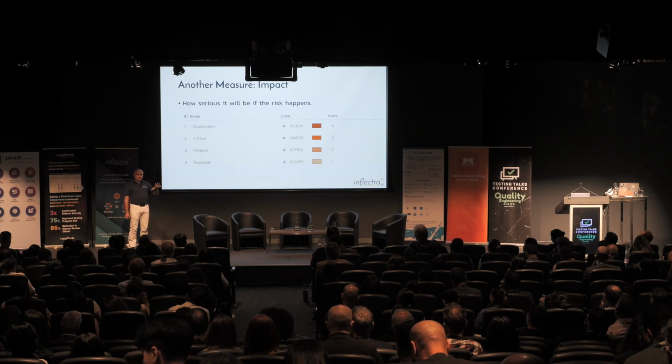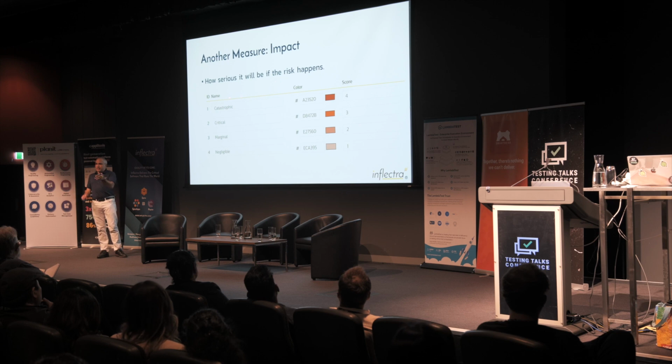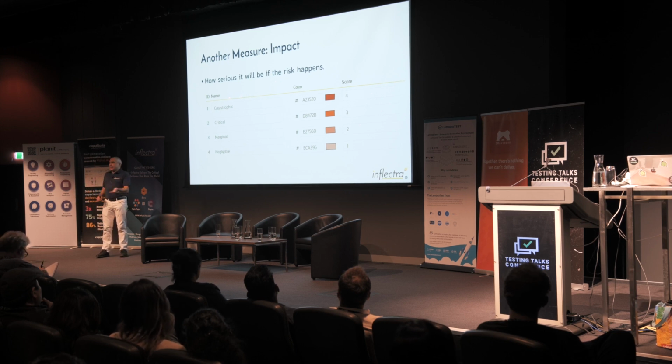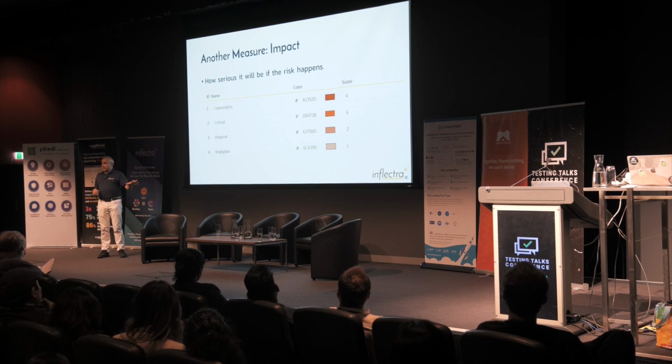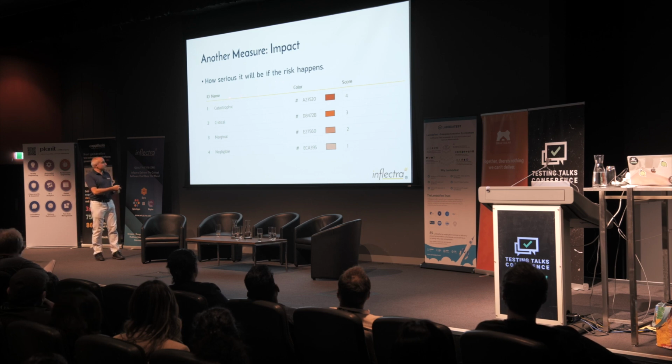It's very easy, I think, sometimes for people to look at a certain risk and go, oh, it's a really bad risk. I'm worried that we've got a memory leak, or we're using .NET 8 and 4.8, and it's got a memory leak, and it's going to be really bad. Whatever it is, don't try and quantify them together. Do it separately, because what often happens is you conflate the 2 metrics, and they are independent. There are things that are very likely that are not that serious, and there are things that are very unlikely but catastrophic. And we as humans often conflate them. So by forcing us to estimate them separately, you avoid that bias that we often have as humans.